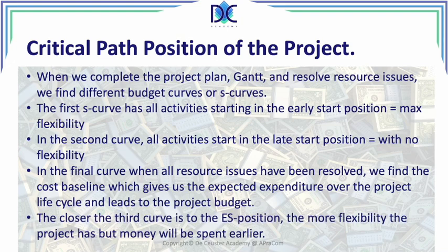When we look at the S-curve and when we see the baseline, the final S-curve, we have to consider how close is that S-curve to the early start or the late start position. When it's closer to the early start position, it means that we have a higher flexibility.